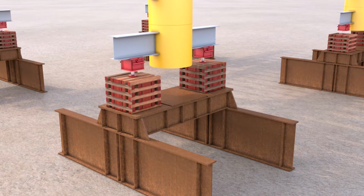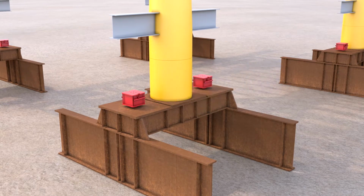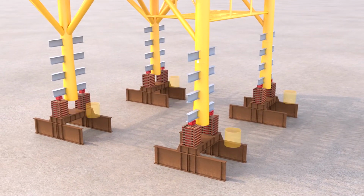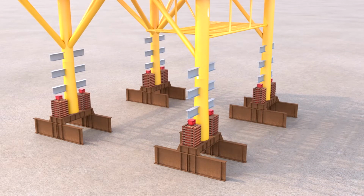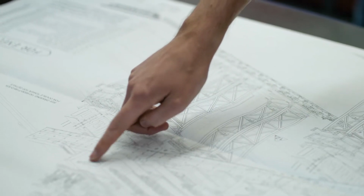This method was time-consuming, involved iterations, and therefore increased the risk. The longer the deck was elevated, the greater the possibility of wind-related issues, stability issues, damage to the deck, and injury to personnel working below. Mammoet believed this could be done quicker, simpler, and safer.